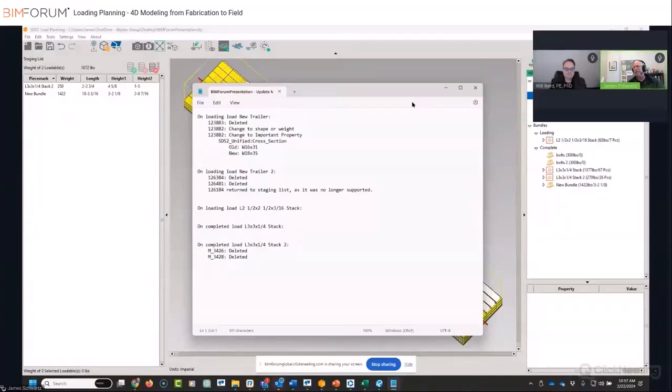That's why I'm saying it depends. Then you could go ahead and have them in the model and update the model, which would show the new openings, especially if the openings have things that may cause clashes, right? And then you could load those onto a trailer and send them out. So I hope that answers that question. It did. But we pretty much got you covered with this.